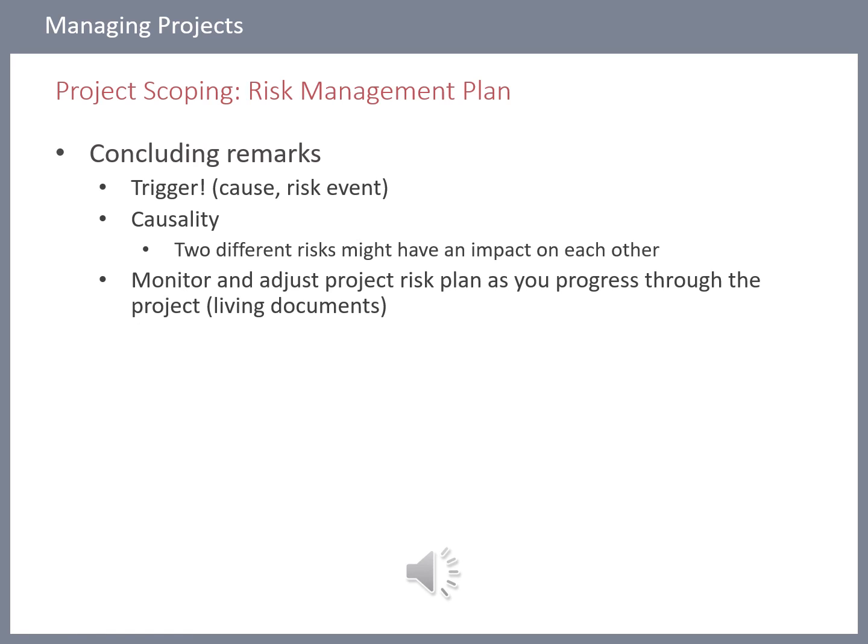Okay, and then lastly, we must always remember that when we talk about these sub projects, like a project risk management plan, these are living documents. You set it up in the planning phase, but through the project you're going to use it as a living document to assist yourself in adding new risks if needed, or removing a risk that you identified but that doesn't really occur in the project. That's why I'm calling this a living document that assists you with risk throughout the project.